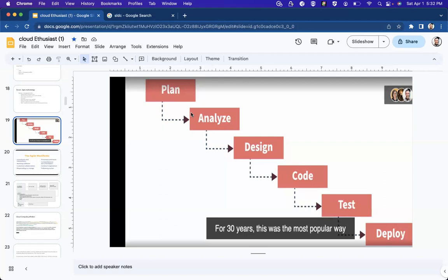We can call that 1 month a sprint. What does that mean, a sprint? It means that, for example, we want to deliver that mobility thing I talked about now. We can say, okay, let us design our first feature, which is making sure that the application tells people how to navigate around on foot. We can say, okay, how long will it take us? Everybody, both the back end, the front end, the geoinformatics engineer, the cybersecurity engineer, we come and form a meeting, we list what we want to do within that month. We'll say, okay, within this 1 month, let's deliver these particular features. Because we target 1 month, it becomes a sprint.